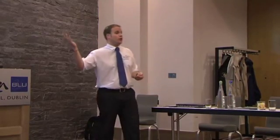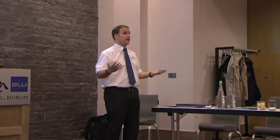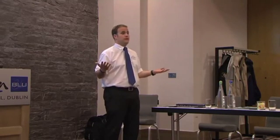But I'm specifically focusing on it as a bidding aid, as an estimating aid. There seems to be potential there for logistics and the prices for prelims. Yeah, absolutely. We do have customers using that. We have O'Reilly Concrete, who take a 3D model and include all their tender quantities in their tender pack. As soon as something's modelled in Tekla, you can get the information out. You just literally put a beam in, right click, and you can tell the volume of concrete in there, what embeds, and what reinforcement is in there.